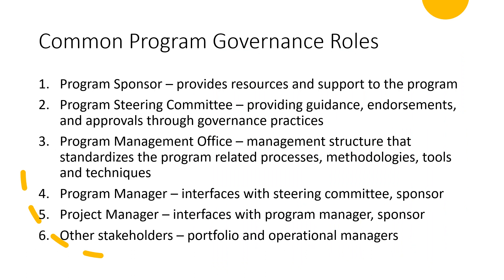Looking at the six common program governance roles: the program sponsor is the person or group that provides resources and support to the program — having a sponsor is very important. The program steering committee provides guidance, endorsements, and approvals through governance practices, and it is critical to have a steering committee in place.